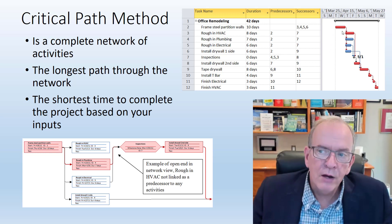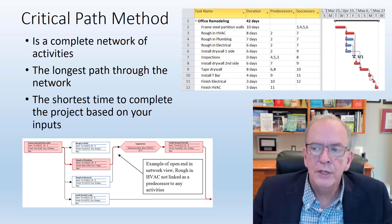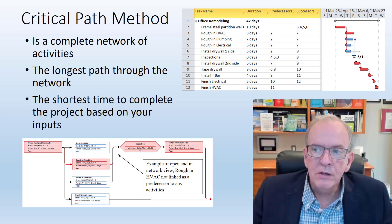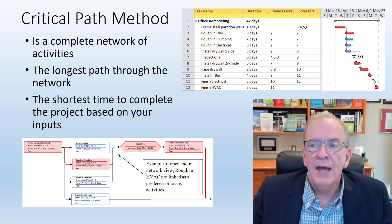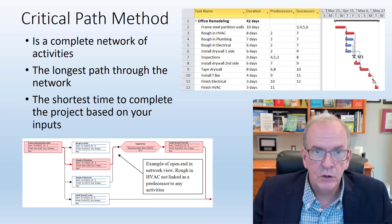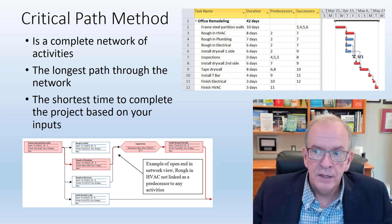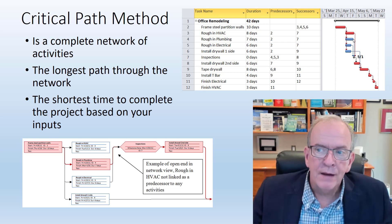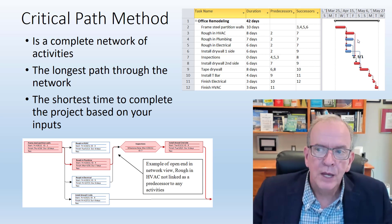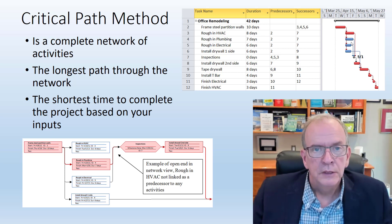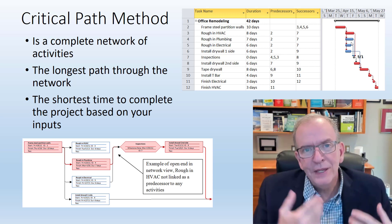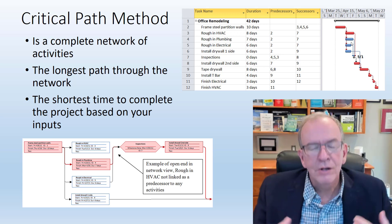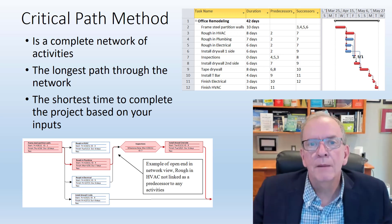It will calculate the longest path through the network. That longest path through the network will become basically your critical path. The ones that are in blue here are not the longest path. They have some flexibility and we call that flexibility float.